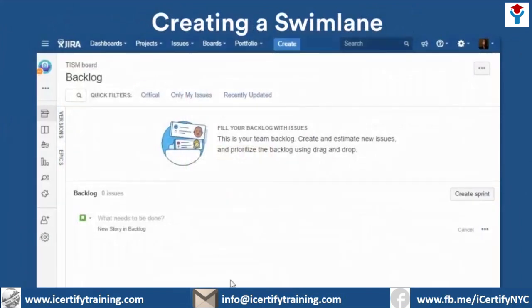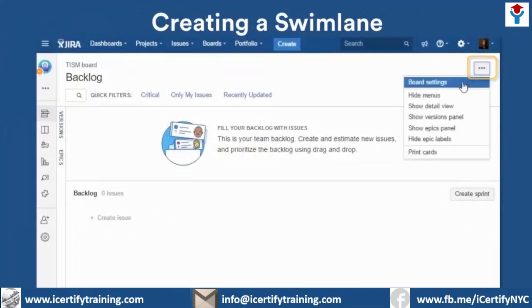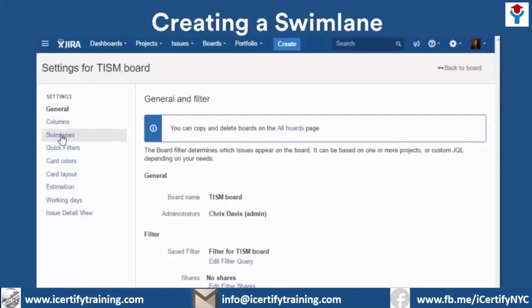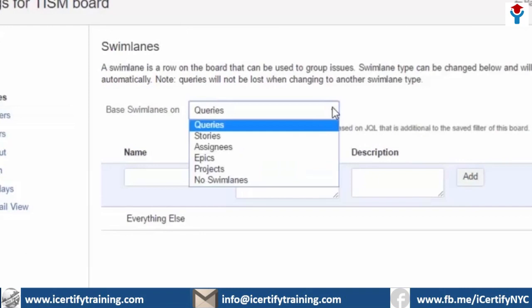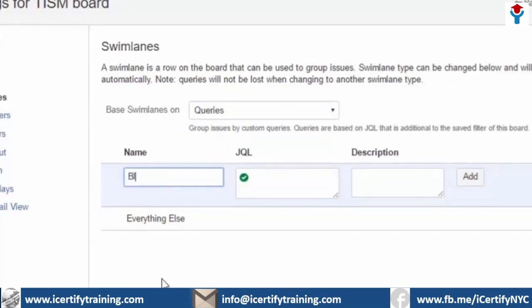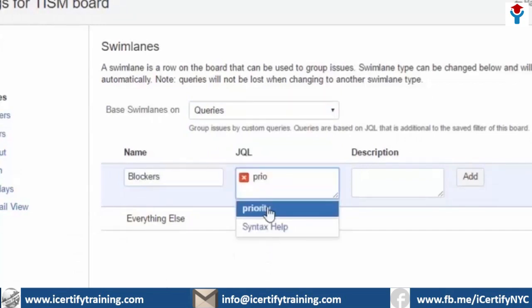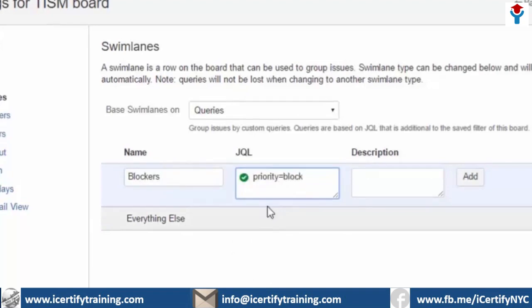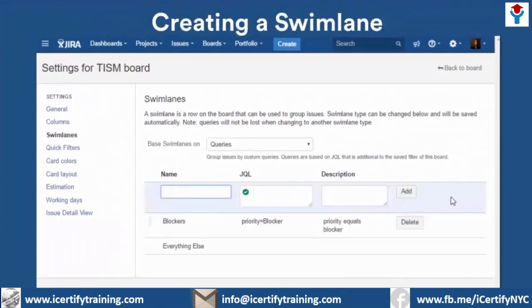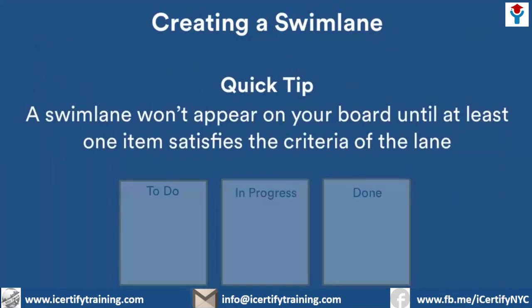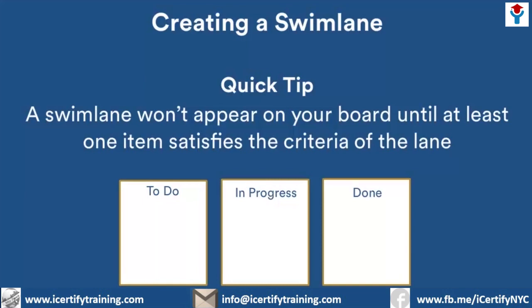To create a swim lane, go to your board, click the More button, then select Board Settings. Select the Swim Lanes link. Next, choose the criteria to define your swim lane. You can create swim lanes grouped by queries, stories, assignees, epics, or projects. Let's select queries and give the swim lane a name — we'll call this one Blockers. To create the query, click the JQL box and enter: priority equals blocker. Once created, issues labeled as blockers will group together in a swim lane at the top of the board. Here's a tip: don't get confused if you don't see a swim lane that you know should be there. Swim lanes don't show on the board until there's at least one issue that satisfies the criteria of the swim lane.